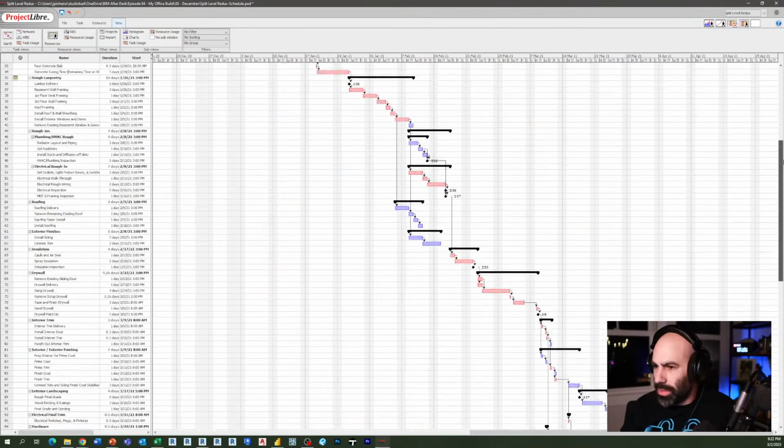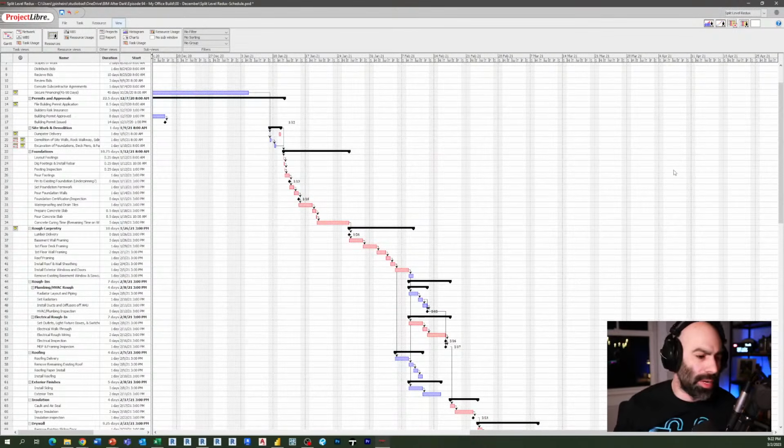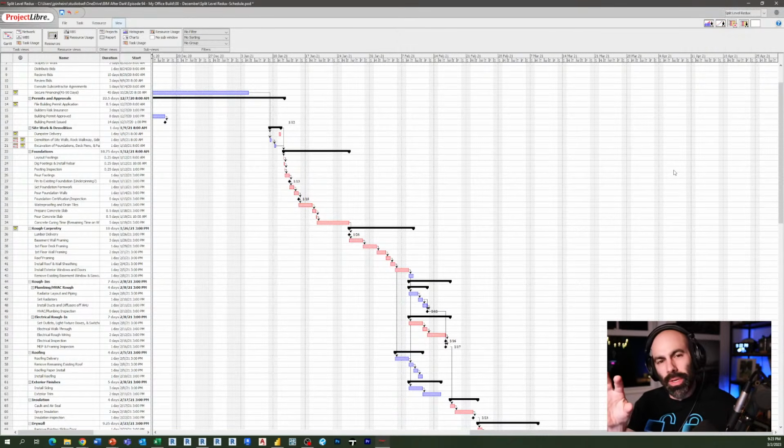You don't have to read every piece unless you really wanted to, but there's a couple things I want to talk to you guys about here, which is I'm using a program called Project Libre. Anyone who's done schedules like this before knows that typically it's Microsoft Project or Primavera P6, Oracle, whatever it's called now. This is actually an open source free scheduling program that is super easy to use. And I'll put a link to it after the stream. It's based on the backbone of those two programs, so if you understand any one of those, it's very simple. But it is extremely simple to figure out.